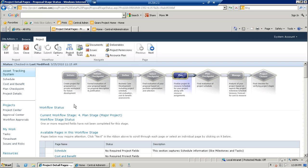It's important, again, to have a good mix in terms of not only the types of projects, but also what stages they're in. We don't want all our projects in the latter half of the life cycle and they're all going to finish at the same time, and then we've got all kinds of resource contention. So you want a good mix, where these things are staggered or in various stages of that life cycle.